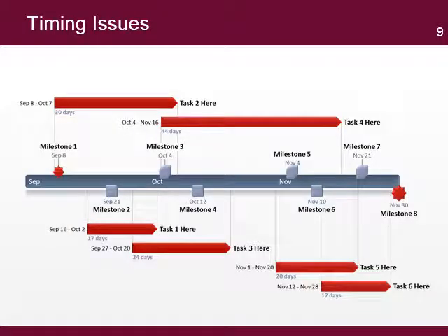To avoid issues with delays in sharing information, the project manager can develop a simple schedule or timeline that identifies the dates when reports are needed. For example, based on a project's fiscal year reporting deadlines to donor and to headquarters, the project can establish milestones and deadlines for submission to ensure the people responsible for them have the time to prepare.